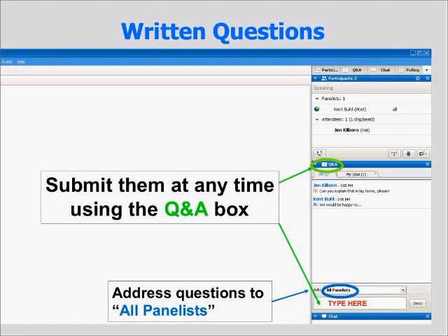Very good. Lori asks, when doing an environmental review for demolition, are we assessing the demolition activity itself or the end result, which may be vacant? Both. That's an excellent question. And remember, we talked about aggregation. So aggregation means we should be doing both.